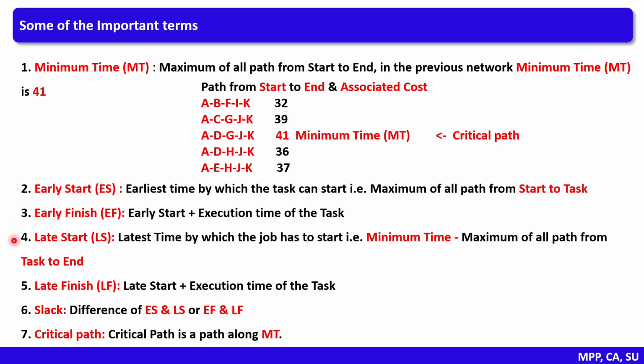Late start is the latest time by which the job has to start. That is, late start is the difference of minimum time and the maximum of all paths from task to the end. Then we have late finish. Late finish is the sum of late start and the execution time of the task.